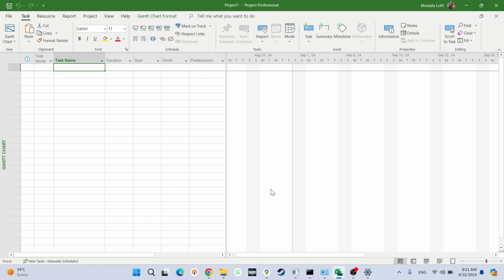In this video, I'm going to show you how you can set up and configure the calendar inside of the Microsoft Project. First thing you should know is every time you create a new project, you need to create a new calendar for that specific project.